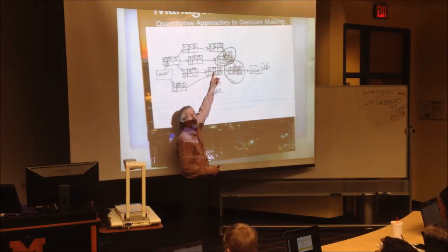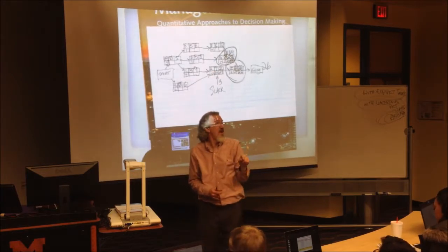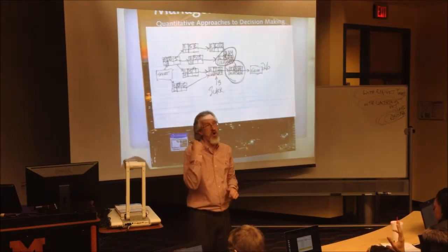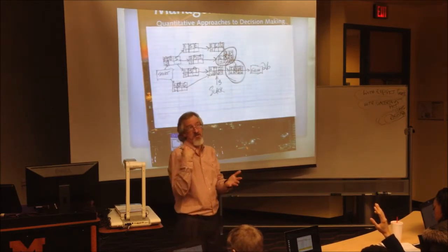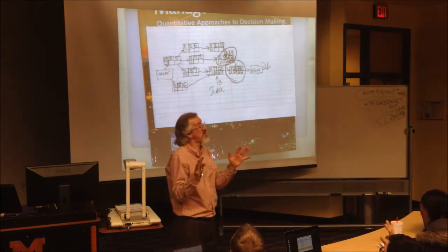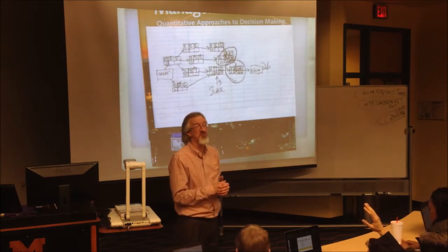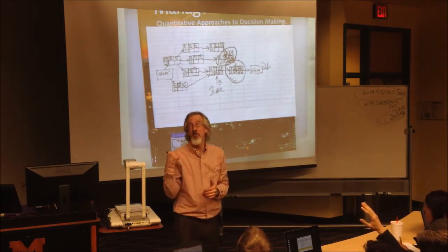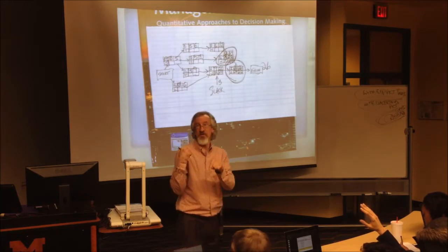What's nice about an activity that has slack is I don't have to call them and make sure they're there on day 9. I don't have to worry about them. When day 9 comes and they're not there, I don't have to stress out too badly, but I will call them and say, hey, we were expecting you today. Are you going to be here tomorrow? I don't let them know they have 3 days, or they'll take all 3 days. This is what I've learned about construction. There are a lot of other activities that probably don't go this way, but with construction, this is how it always went. I'm not going to tell them they have 3 days of slack, or they will not be there for 3 days.